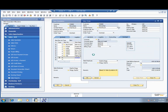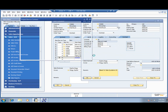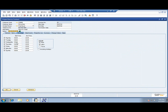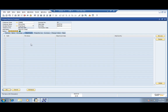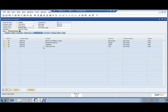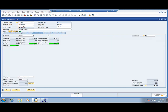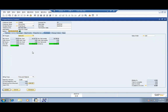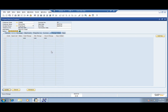Let's recall our sales order and drill down on the project we've just created in the system, reviewing the milestones and so forth associated with it. You can see our coverage is Monday through Sunday, along with the parts and labor we mentioned. We can include attachments of anything necessary. We've got our milestones or phases to process as we go through this, and we'll keep track of a summary of what we've completed. The numbers will update on estimated hours, additional hours, estimated cost, and actual cost. You can track your change orders here — it's very important to track those changes and keep revenue from leaking outside the organization.